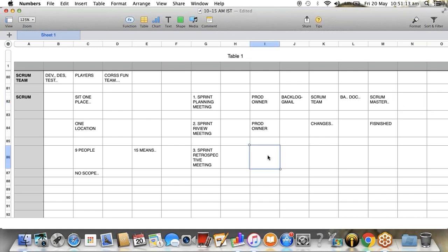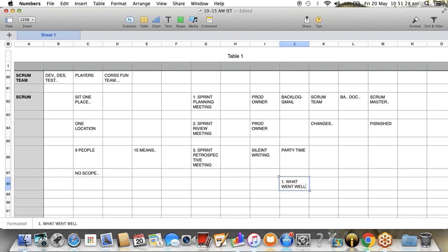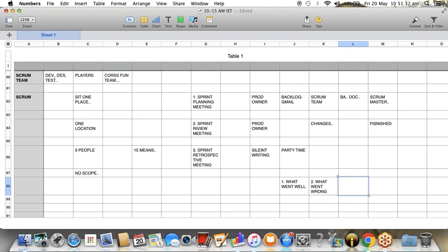And the last is the retrospective meeting, which is a silent writing. What do you mean by silent writing? Some serious decisions will be taken here, and we also call it party time. Three questions will be raised here. What went well? Second, what went wrong? Third, where to improve?